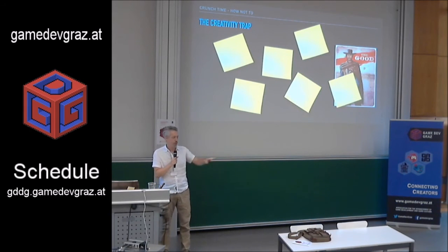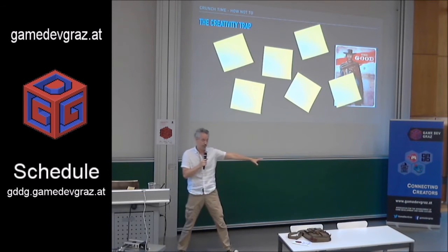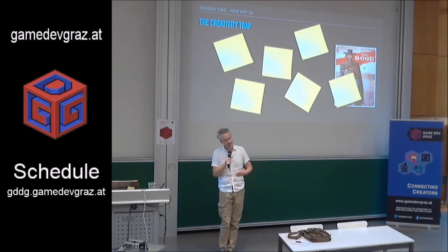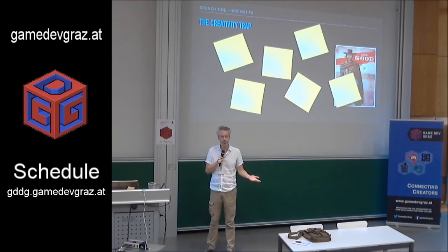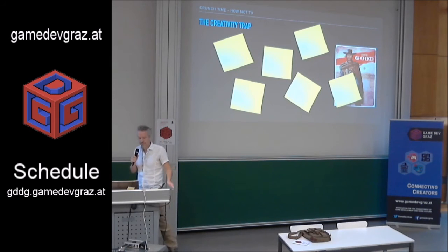And in addition to that, it sometimes helps you to point out misunderstandings, because if somebody only has to do a red cube over there and it takes him 2 days and he says, well, I will be done by tomorrow or the day after tomorrow, you look at him and say, oh, that is only a red cube over there, that's all you have to do. So then you can discuss why he thinks it takes 2 days for a red cube. Maybe he has to learn the 3D program at first. That's a good one, but even then you can do it in 2 hours. So you can discuss what's going on if somebody has a completely different understanding of his task than you have. Easy.